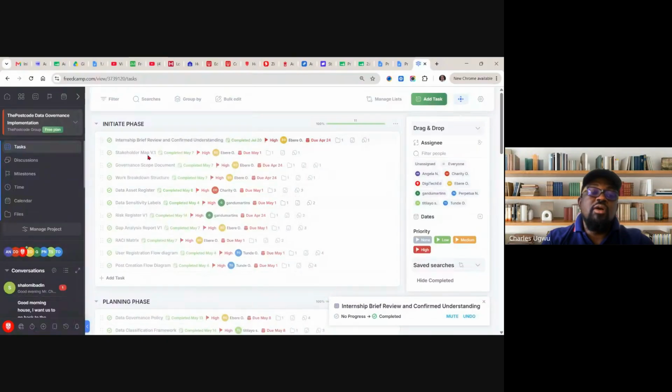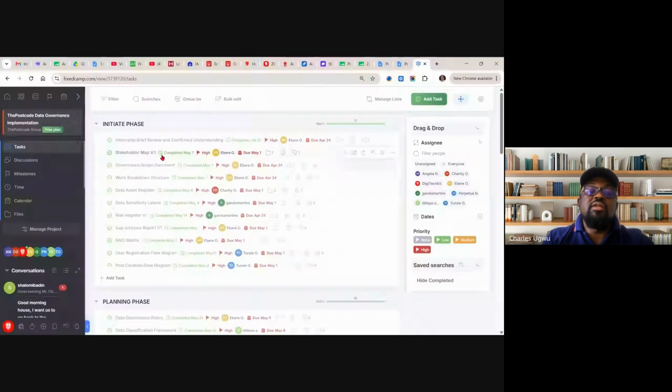You see why all these are tools. If you are reporting, you must understand how they work. So whatever the week or duration you are reporting, talk about the work you are reporting, the ones completed. If all the things you want to do within the week, you completed them, you state that, yes, they are completed. If there are some you couldn't start, you state the one that you couldn't start and the reason why you couldn't start it, because these are things you've mapped out to do for the week. If there are some that are still ongoing, maybe you couldn't finish it up, you talk about the reason.